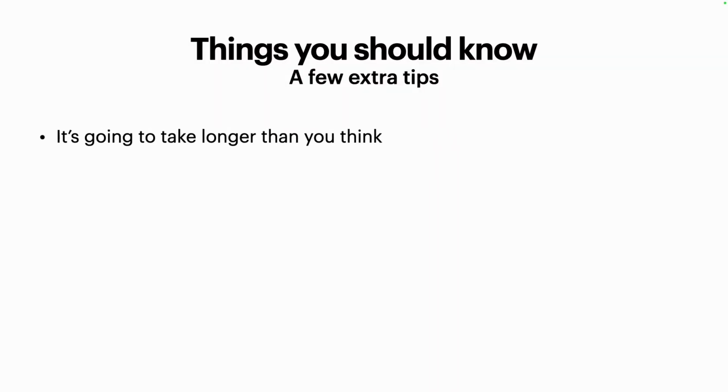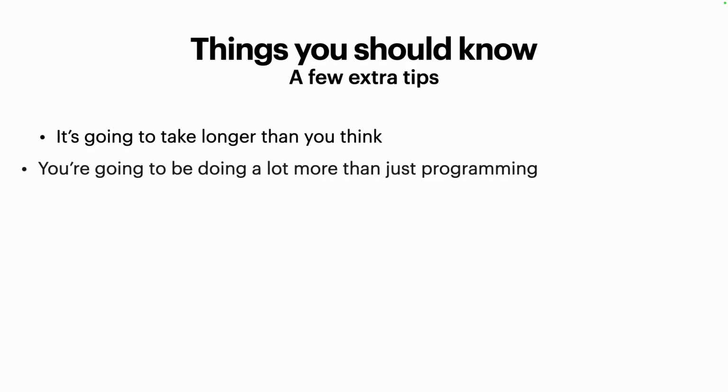Here's a few extra tips. It's going to take a lot longer than you think to make your first game. Take your game, think about how long it's going to take to make everything, multiply that by 4, because it's going to take 4 times longer. You're going to hit a lot of barriers that you're not going to see ahead of time, and it's going to take a lot longer.